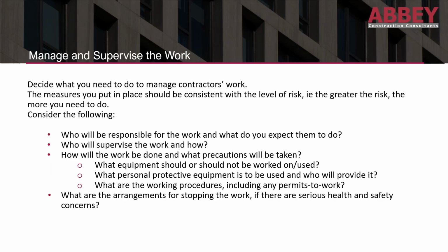Decide what you need to do to manage the contractor's work. The measures that you put in place should be consistent with the level of risk. So, as I've said, the greater the risk, the more you would need to do. Consider the following. Who will be responsible for the work and what do you expect them to do? Who will supervise the work and how will they supervise it? How will the work be done and what precautions will be taken? What equipment should or should not be worked on or used? What PPE is to be used and who will provide it?